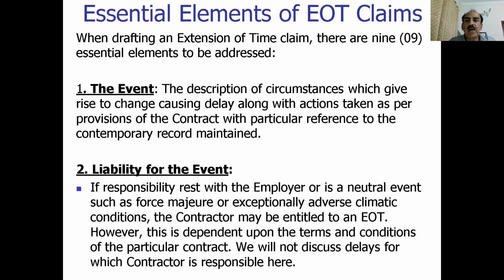But anyhow, in this last lecture, we are purely explaining the circumstances where the employer had some problem, like we have in a COVID condition at the moment. Now, this is purely a condition which is just like a force majeure, and the works and the projects have been closed and forced to close. Therefore, in such kind of a situation, there cannot be the fault of contractor, and we certainly would need to have an extension of time. And we also expect that there will be some claim out of this.